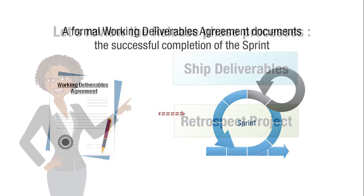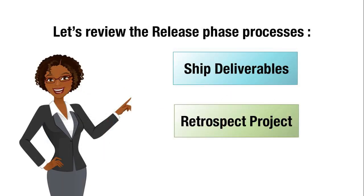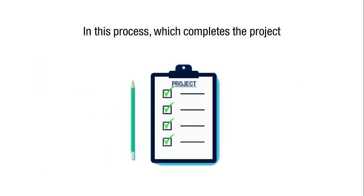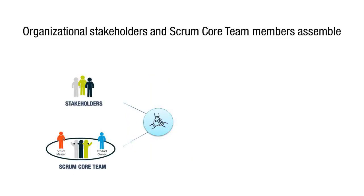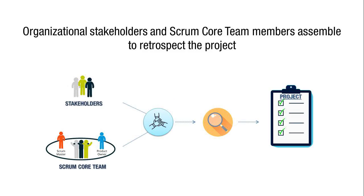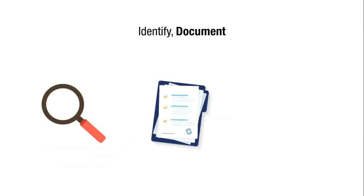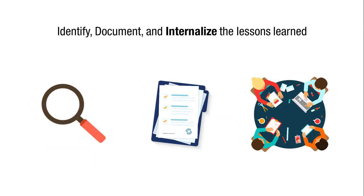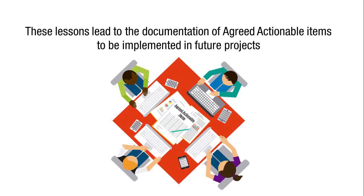The second process is Retrospect Project. In this process, which completes the project, organizational stakeholders and Scrum core team members assemble to retrospect the project and identify, document, and internalize the lessons learned. Often, these lessons lead to the documentation of agreed actionable items to be implemented in future projects.